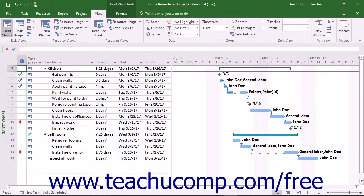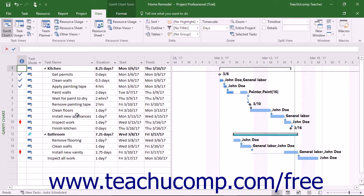When you automatically level resource overallocations, Microsoft Project will either delay the start time of tasks, delay the work resource assignments for a task, or split task durations to resolve the conflicts.